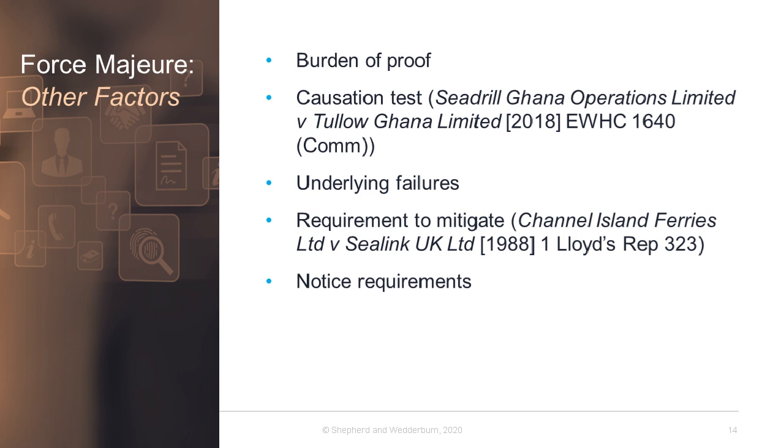In the Seadrill Ghana case, the force majeure provision contained a causation requirement which was, "if and to the extent that fulfilment has been delayed or temporarily prevented by an occurrence as hereunder defined as force majeure." The case involved an oil rig hire contract, and the court found that the contractual failure was caused by two matters, one a force majeure and one which was not. The affected party could not rely on the force majeure clause.